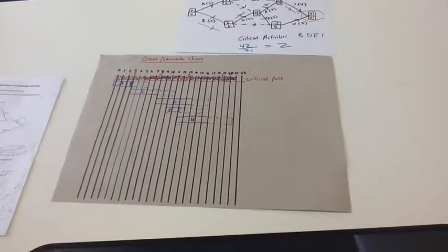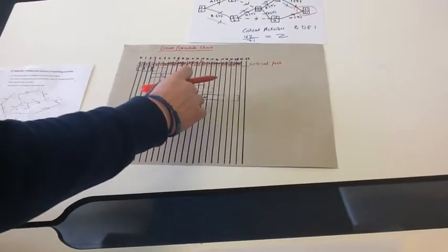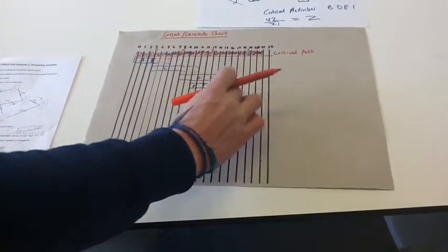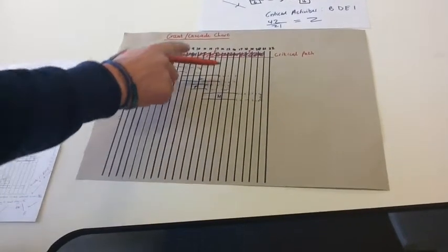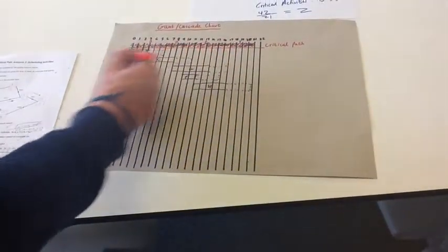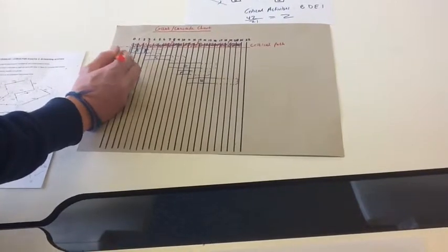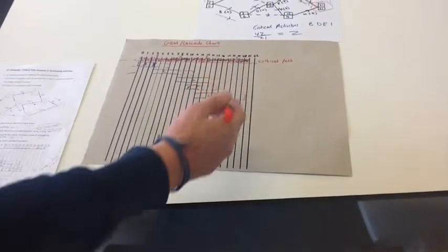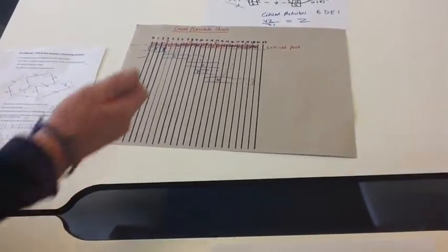And basically what that's saying is if you can draw a thing called networking or planning or something, and if you imagine you move that up there, and then you move that along there, and that went up there, you could actually get it done by 2 workers because it fits on 2 lines. Each little line represents the workers that it would take, and that one's showing that you can do it with just 2 workers.